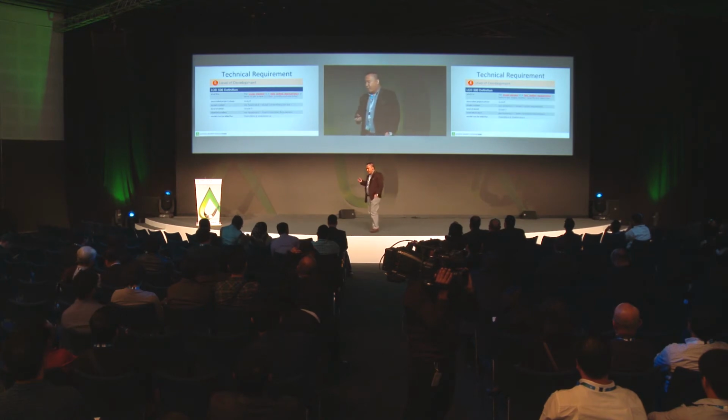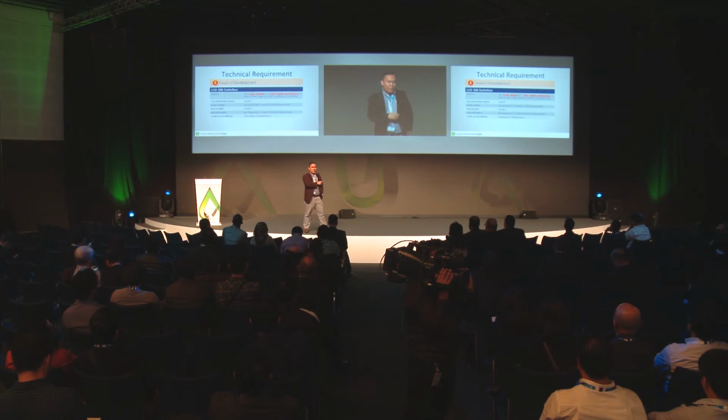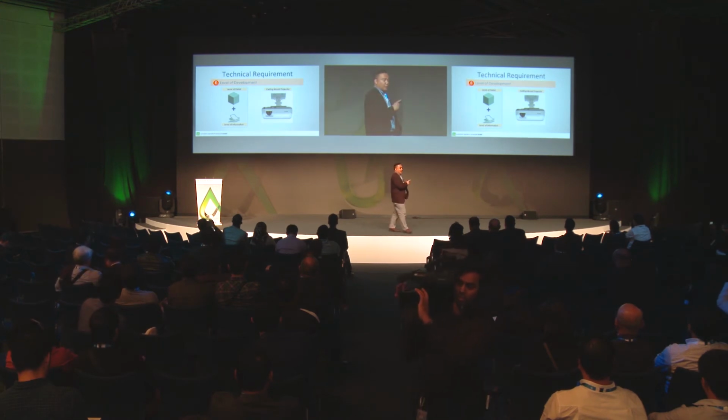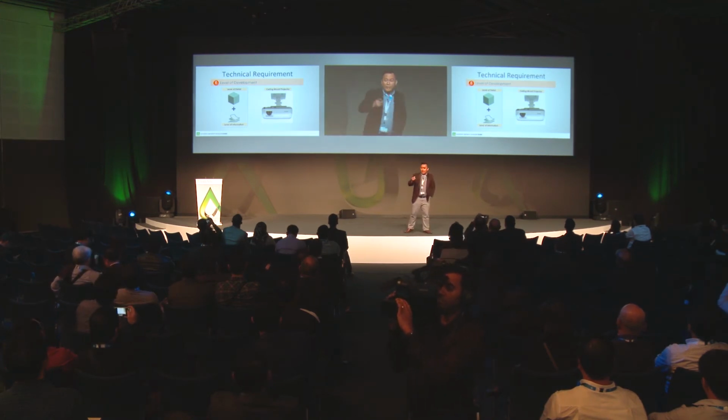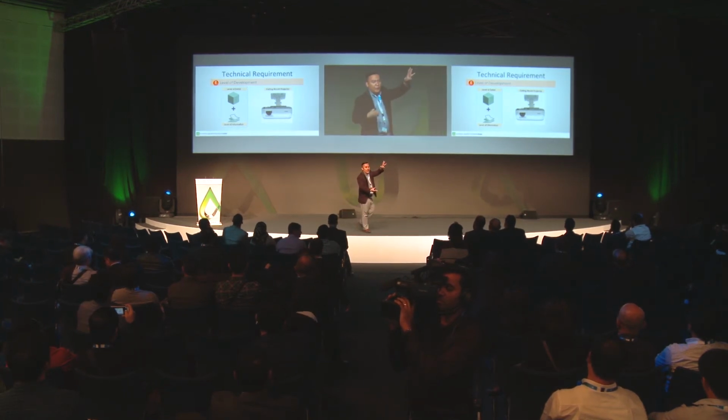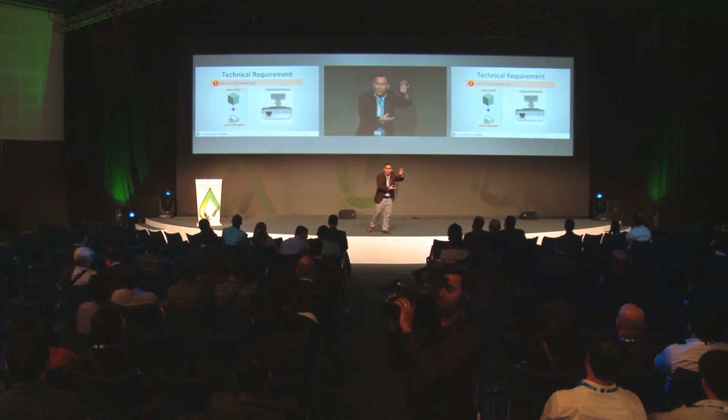Now you will ask me, hey Rexter, how can we put this into real practice? Can we put this into practice, or is this only a document? Yes, of course, we can. Let's have in mind that level of development is actually level of detail plus level of information. When I say level of development, it is not the same as level of detail. It is actually level of detail plus the combination of the appropriate information.